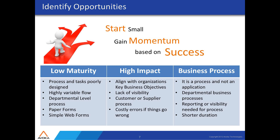To get started, there are three main themes: low maturity, high impact, and make sure it's a true business process that fits nicely. When we talk about low maturity, we mean the process is poorly designed, paper-based, all over the map — no visibility, they don't really know what's going on. High impact doesn't have to be a huge massive project; sometimes that's what you want to avoid. Our rule of thumb at Motorola was if we couldn't knock the project out in less than six weeks, we wouldn't take it — it had to follow a more typical IT approach.